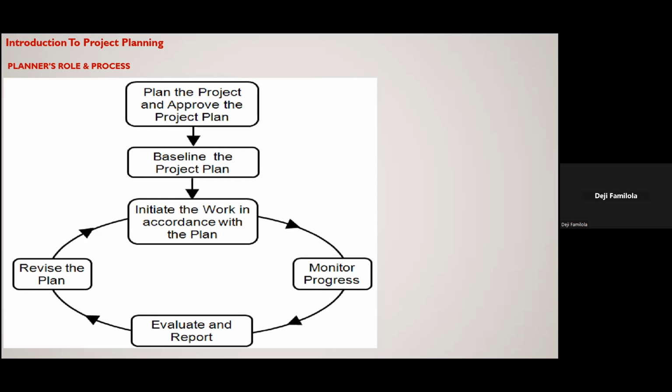They would go look at it, look at everything. They make a decision and come back to you if they want to implement it or not. So if they want to implement it, you go into your plan, do the option you've given them, develop that into a full plan. Then they can say, okay, we need to rebaseline, we need to re-agree that this is the plan we will use going forward. So that is just a brief narrative of this.